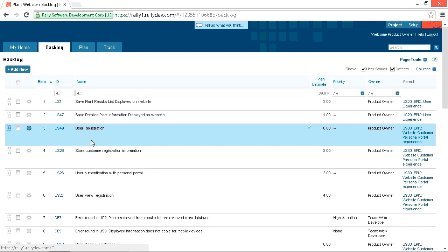When a user story is worked should be based on its priority, independent of other user stories in the backlog. If user stories are dependent on each other, the dependency will determine when the user story is worked, rather than the priority. In the beginning, you want to write user stories to establish the system's foundation. These early user stories will deliver a slice of functionality to the user that is demonstrable.